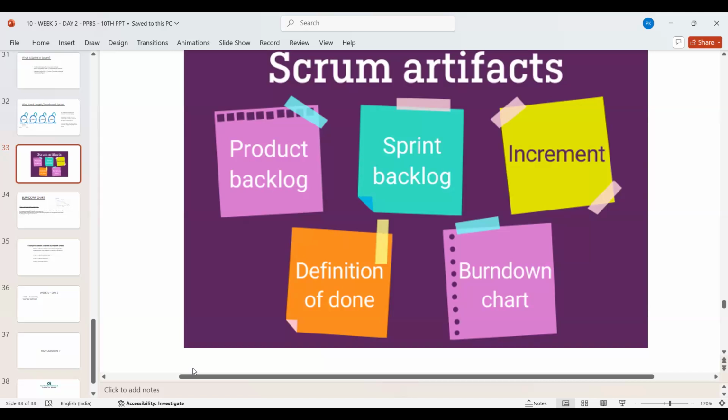So this gives us a very good understanding of how much work is done. For example, if you had 50 requirements and you completed 10 requirements, you know that 10 are complete and 40 are yet to be complete. Then, are we on speed or not? We were supposed to finish 15 requirements during this sprint, and we are still at the third requirement, so do we have to speed up, or will we be able to complete? So basically it just shows where we are and what we are doing.